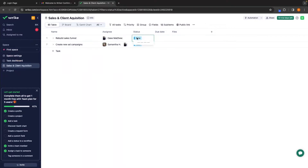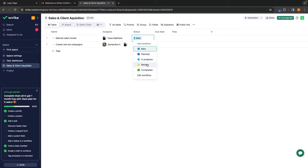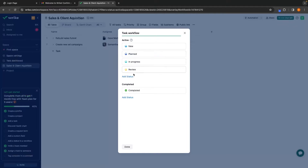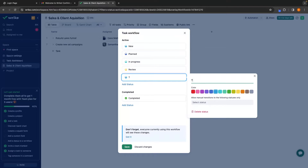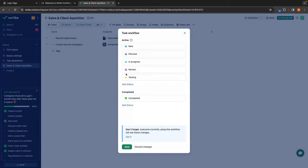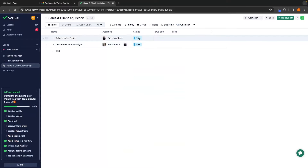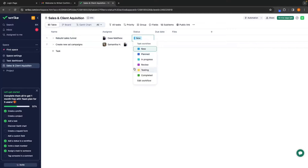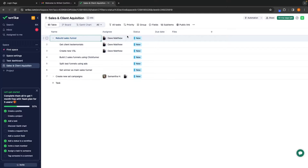Next we can move on to status. We have: New, Planned, In Progress, Review, and Completed. We can also go to 'Edit Workflow' right here and change all of these. So if I wanted to add a new status called 'Testing' and set it to maybe a yellow color, and change Review to purple — you can see that 'Testing' has now been created. I can save these changes, and then me and each of my team members can click into this task workflow and let everybody know how the task is progressing. We can also do the same for individual sections.